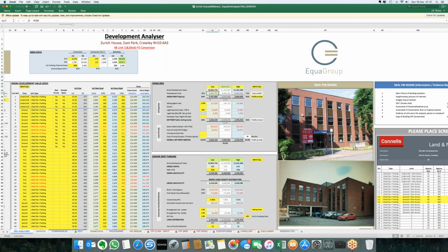When we then deduct the costs from the gross development value on our low, medium, and high ranges, we get to our gross profit position. This is the starting point, before selling costs and before costs of funds.